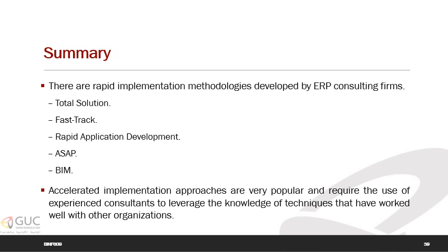Consultants play an important role in rapid implementation of ERP systems. Rapid or accelerated implementation approaches are very popular and require the use of experienced consultants to leverage the knowledge of techniques that have worked well with other organizations. Scripts and wizards developed by consulting firms can help to automate some of the more common tasks that occur during an implementation process. These include migration of data, identification of duplicate data, and other standard tasks.